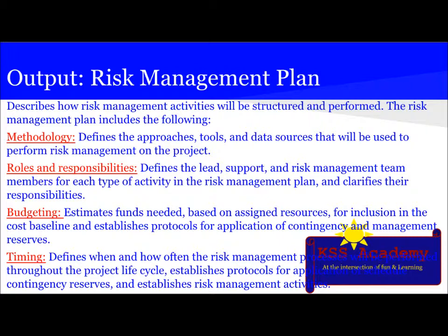It describes how risk management activities will be structured and performed, and they include methodology, which defines the approach, tools, and data sources that will be used to perform risk management on the project. The next thing it defines is roles and responsibilities, which defines the lead, support, and risk management team members for each type of activity, and clarifies their responsibilities.